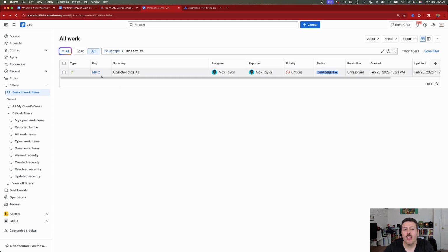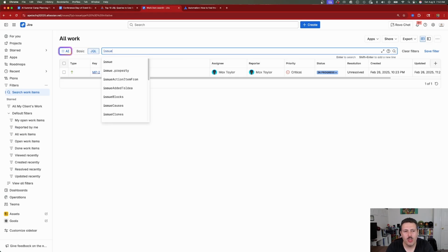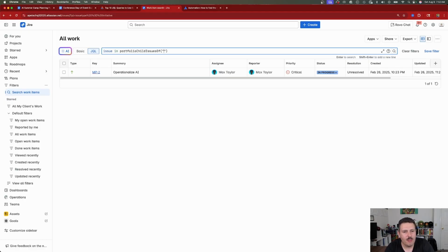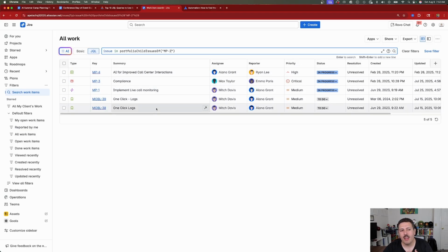And so the first thing we want to do is we want to find our initiative. So in this particular case, I have an initiative right here. So what we're going to do next is we're going to go into issue in, and then we get a lot of different functions like we looked at earlier, but this is the one we're looking for, portfolio child's issue up. If you do not see this, then that means you are not on the premium version of Jira, and then this is not going to benefit you as well. Now this is case sensitive, so type in MP-2 and hit enter. And what that's going to do is going to find you every descendant.